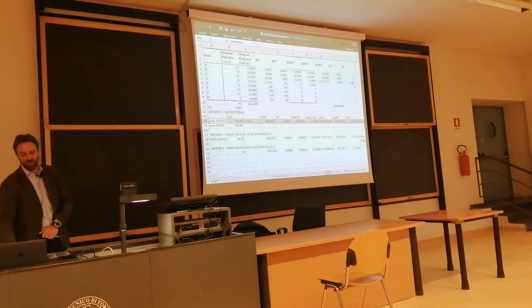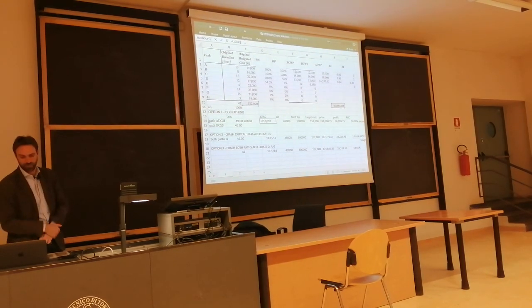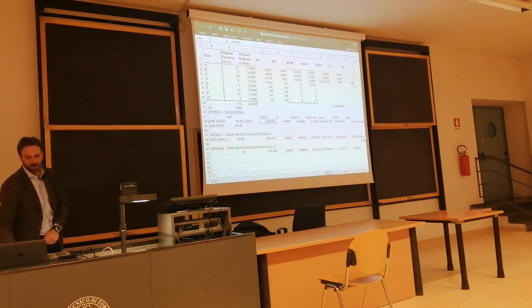a cost estimate at completion based on the average cost index to 152,000. A revised approach for the cost: overhead that would be incurred is 1,000 times 49 days.